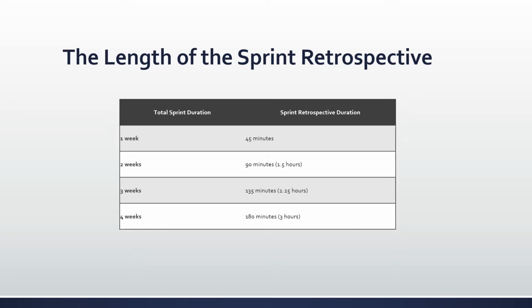So the Scrum team identifies the most helpful changes to improve its effectiveness, and the most impactful improvements are addressed as soon as possible. They may even be added to the sprint backlog for the next sprint. The Scrum Master encourages the rest of the Scrum team to improve its processes and practices to make it more effective and enjoyable for the next sprint.